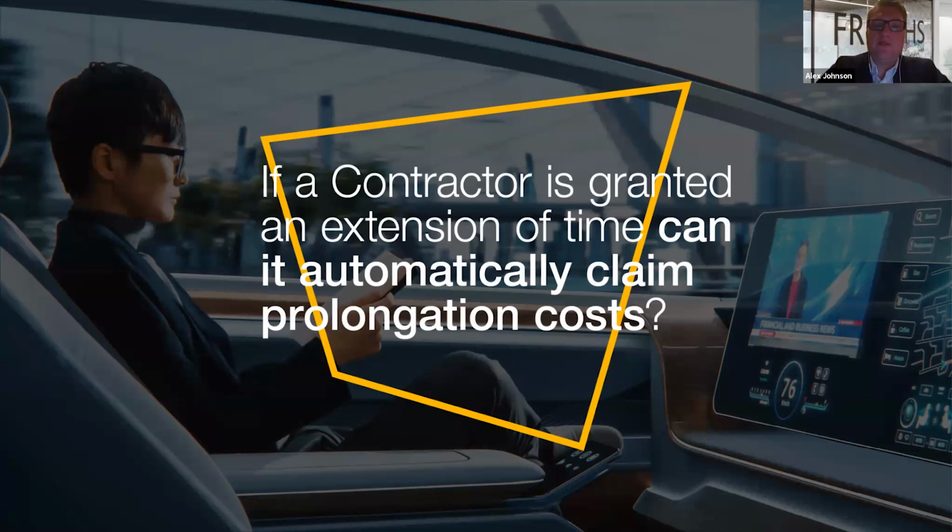So technically, the only real money effect of an extension of time in and of itself is to relieve the contractor from its liability to pay liquidated damages. Now, compensation for financial losses that the contractor suffers as a result of a delaying event is a separate matter. Contracts that have events that entitle contractors to extension of time and events that entitle contractors to additional payment are very common, but these things are separated.